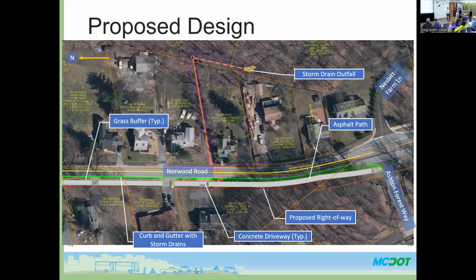This type of project is very common in the county. We look at it on a per linear foot basis. So using that, we're able to extrapolate: on a previous project with this many linear feet, this was an approximate property acquisition cost. This project is X number of linear feet. So what's the ratio? What's the estimated number of linear feet?